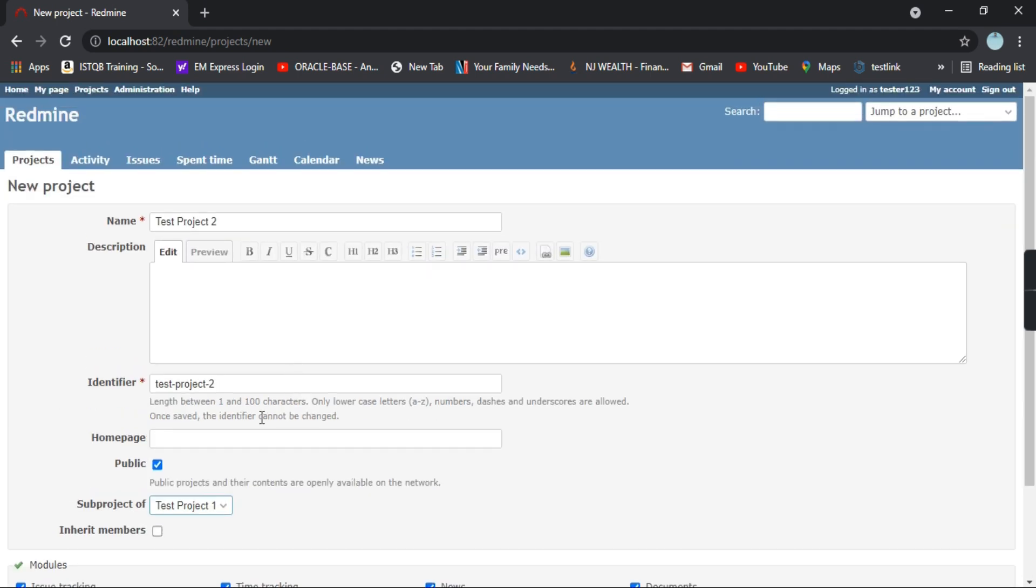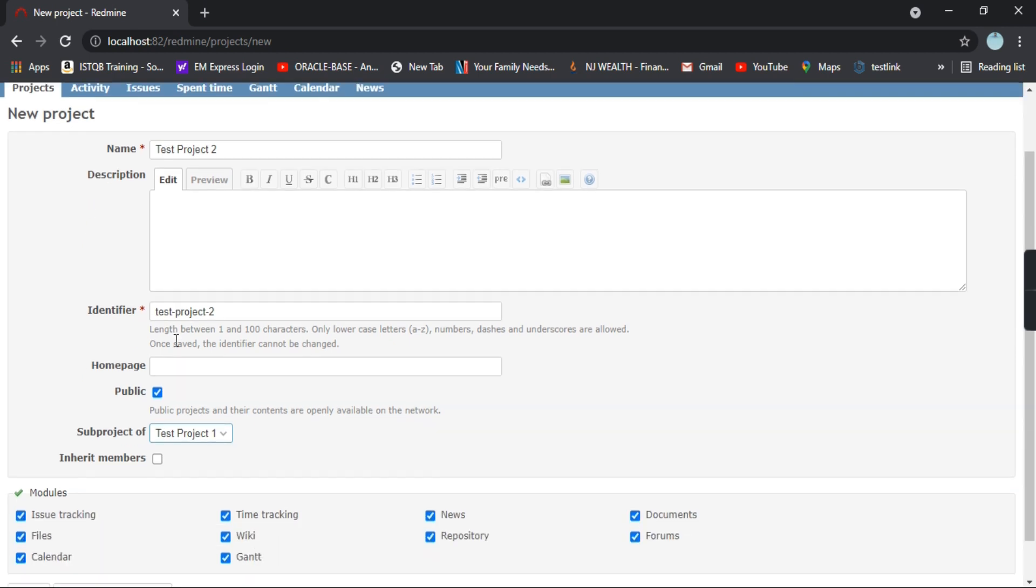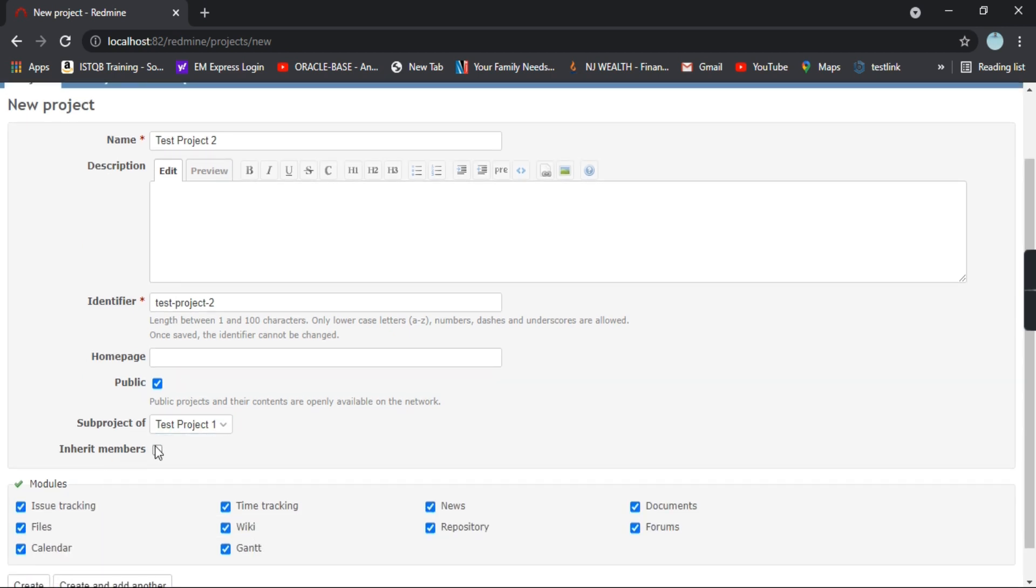Suppose in project 1 you have already allocated some team members and you want those members to have the access of this project as well. So you can just select this option as inherit members.